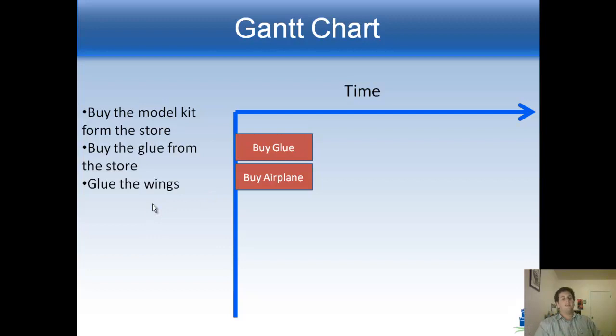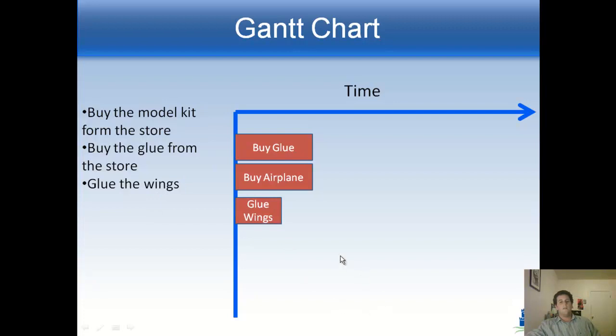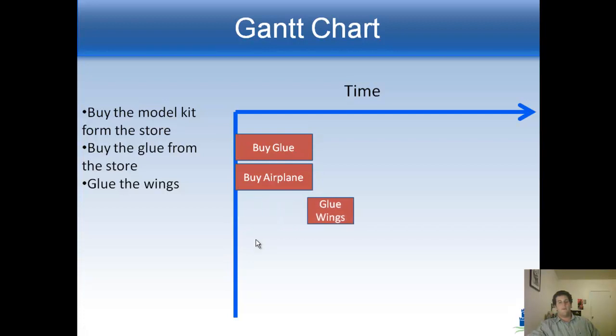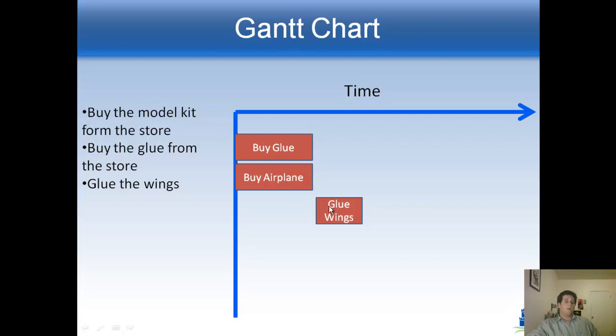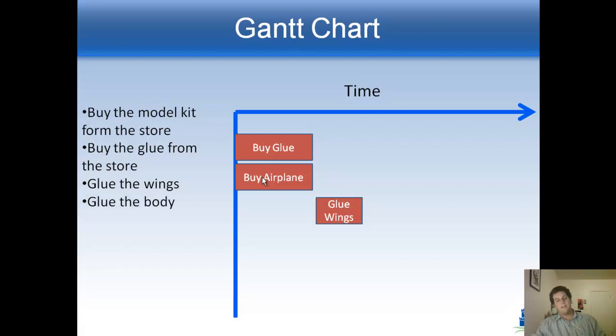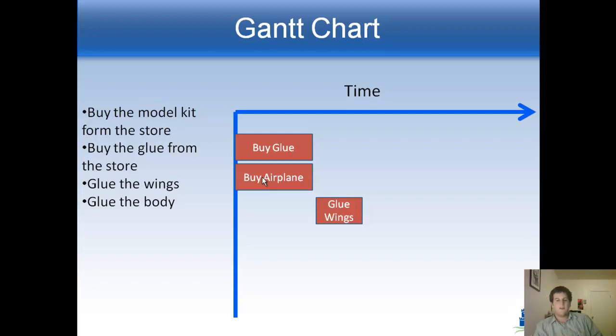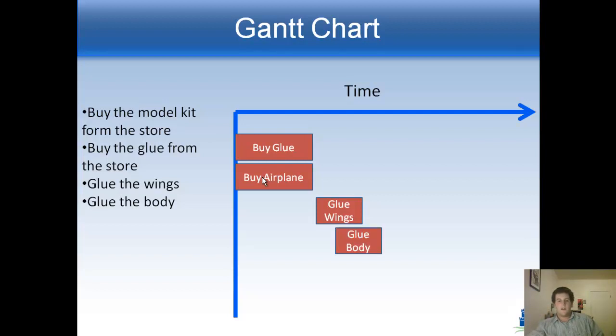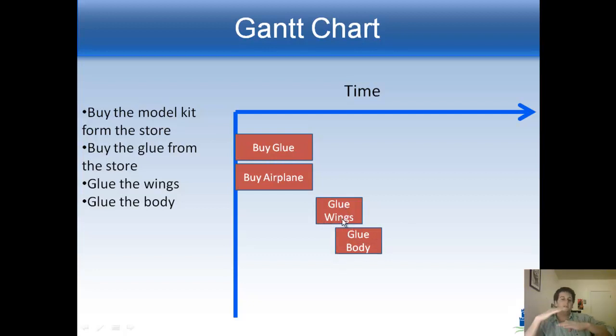Okay, the next thing he has to do is glue the wings together. But he can't glue the wings together until he's bought the stuff. So we can't put glue wings here because he can't start to glue the wings until he's finished buying the airplane. And so that means that the wings actually have to go over here because you can't glue them until they're done being bought until you have the glue from the store. And that's called a dependency. That's called a predecessor. That means we can't glue the wings until we're ready to go back here. And of course, we also have to glue the body together. And this is interesting, right? Because gluing the wings, that takes some effort. You have to get in there with your little glue stick or whatever and glue it together. But there's also some time that you have to sit there waiting while the glue dries. And while that glue is drying, you can start to glue the body. Right? So let's say here I've glued the wings together, but now I'm gluing the body together while the wings are drying. So sometimes you can have two things that happen at the same time, but maybe you don't start at the same time.